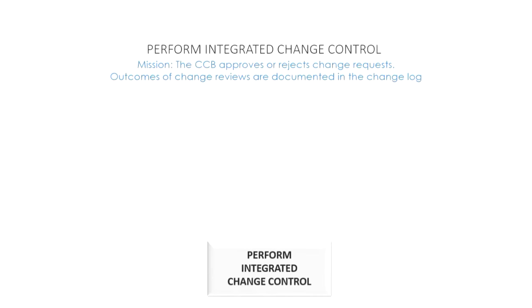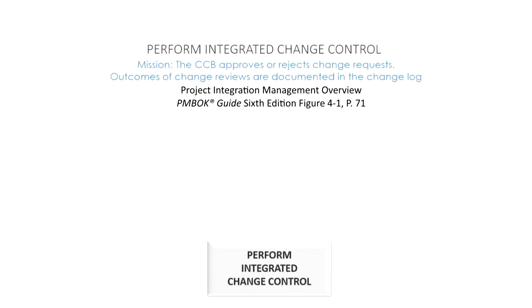Take a look at the screen. This process is all about the change control board approving or rejecting change requests. Outcomes of change reviews are documented in the change log — a formal document where all change request information is captured.